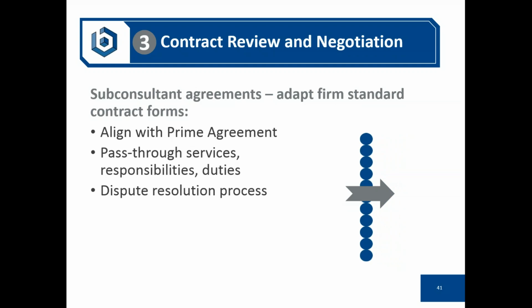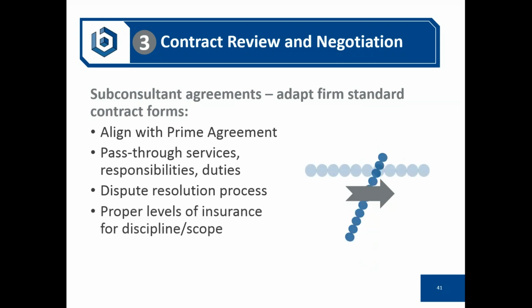We've unfortunately in our claims department seen situations where there might be a customized architect consultant agreement that doesn't align with the AIA owner architect agreement, and you may be in a different dispute resolution with your consultant, and that makes it impractical to involve them in the dispute venue that you have with your client, the owner. So be very careful about that.